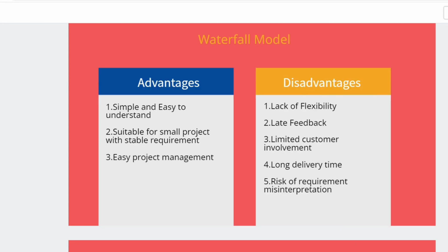When your team is small, it is very easy to use the waterfall model to manage the project. Suppose you are working on a freelancing project and the application is already developed. In that case, you can use this waterfall model approach for the testing and for the maintenance and all those purposes. But consider that your project is big and the requirements are changing frequently. In that case, the waterfall model will not work. So let's see what exactly the disadvantages of the waterfall model are.